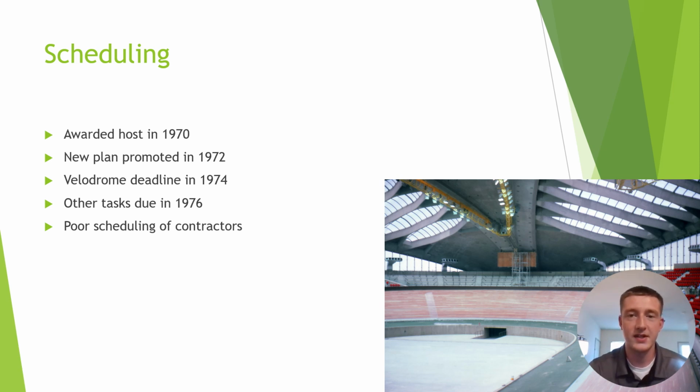Patel et al. state, on May 12, 1970, extensive lobbying and diplomacy by Montreal Mayor Jean Drapeau paid off when Montreal was awarded the 1976 Olympic Games over strong bids from Moscow and Los Angeles. However, no work was completed for the subsequent years. The original plan was scrapped for a new architect's plan in 1972. Effectively, this cut the project's time to just 4 years instead of 6.